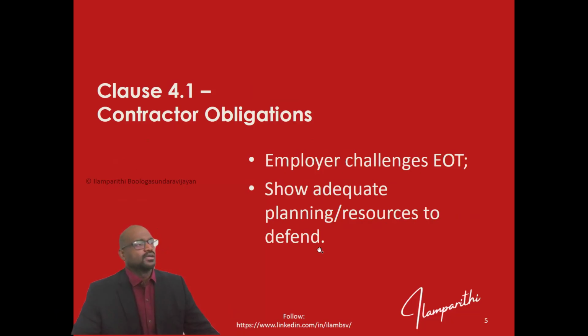Clause 4.1, contractor obligation. You should always keep in mind that whenever an EOT is submitted, definitely it will be challenged by the PMC or employer, because they have the rights to challenge and they have the capacity to determine whether the EOT is right or not. So at that time, you have to show adequate planning and resources to defend, because most of the defense from the employer or the PMC will straight away focus on the productivity of the contractor, and it will question the resources. See, in the plan you have shown you will bring this much resources, but you have only brought very few resources to the site. So be ready to address that.